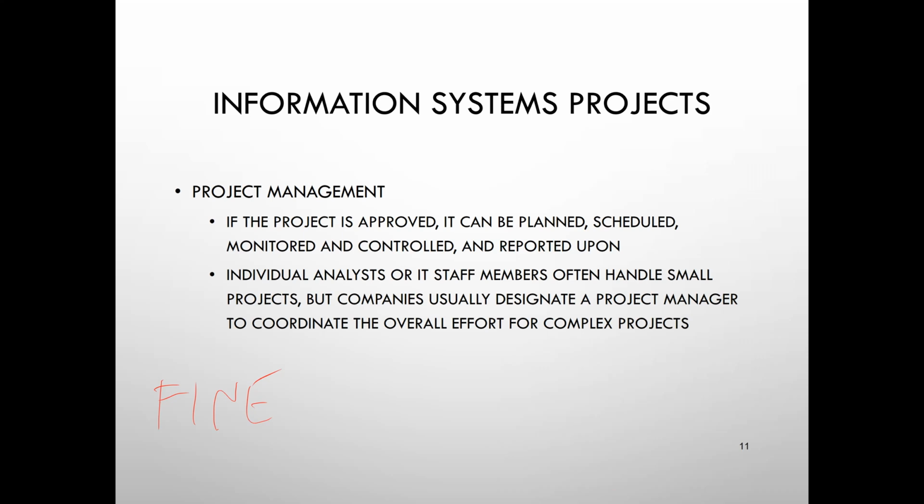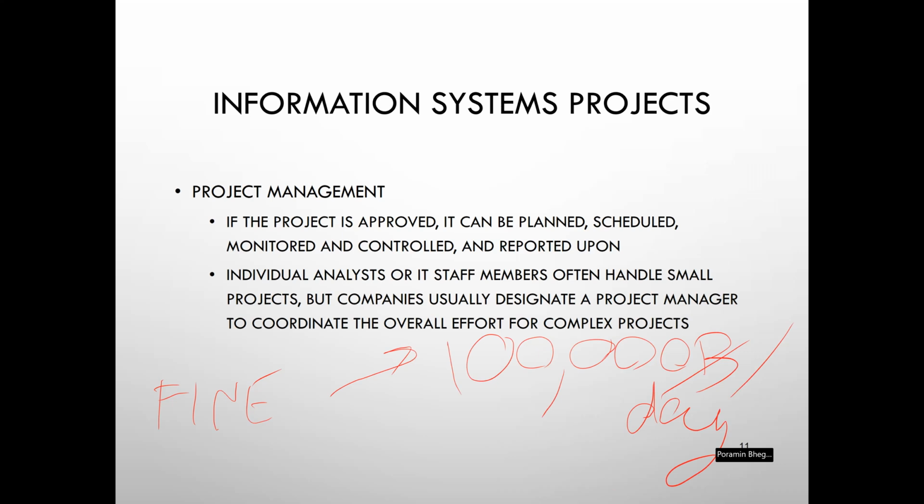For example, they may say 100,000 baht per day if you can't finish. So that's why we need the project manager to help control, so that at the day the project should be finished, it isn't delayed.